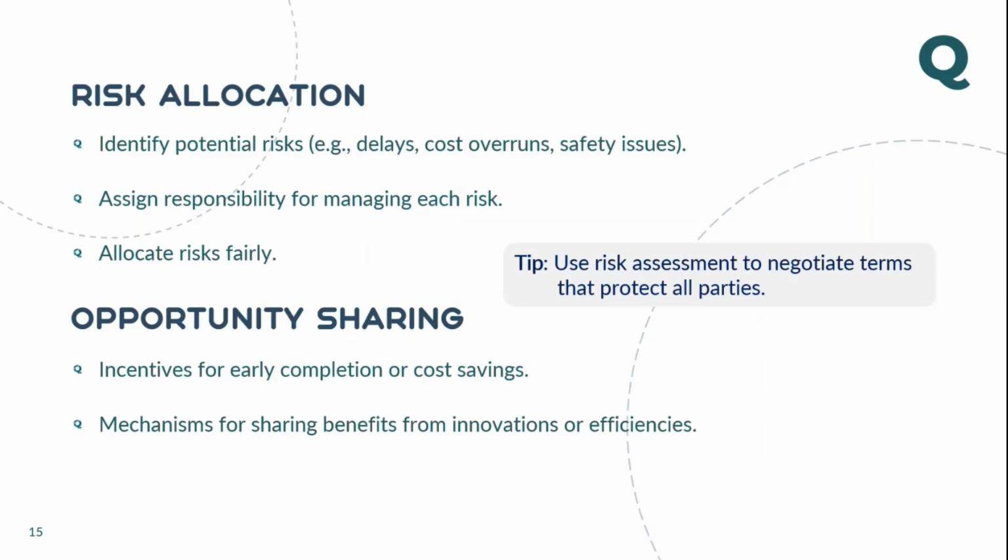Then they are asking for retention of 20 percent. Again, a risk. Normally you anticipate 10%, but now they are asking 20%. That is also a hit to your cash flow. So how are you going to manage that risk? Can I ask for early release of payment by submitting a bond? Then performance security. DLP period more than 2 years. How are you going to manage that?